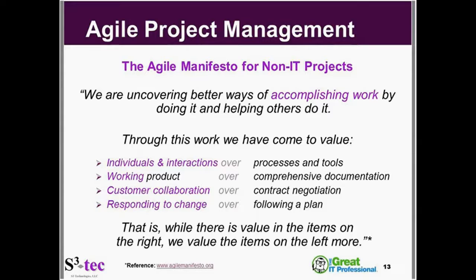That does not mean that during a week-long iteration, in the middle of the iteration, we can make a change to that. The change we can make is to end the iteration if we find that that is not valuable and restart with a new iteration. So the client that walked in said, well, we're being agile to change things in the middle of the iteration. It actually isn't, because it doesn't mean we don't have a plan. We do have to stick to our commitments, and we do have to deliver. We have to deliver on value, and if we change our plan every 2 days, we're never going to deliver anything. So that's not agile.